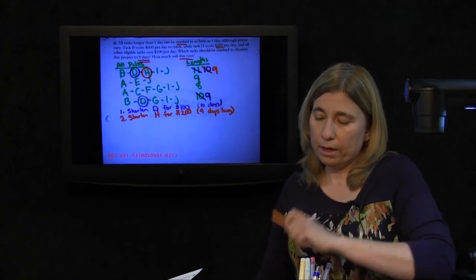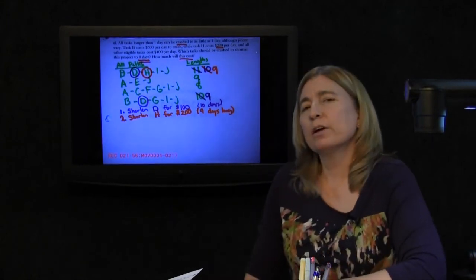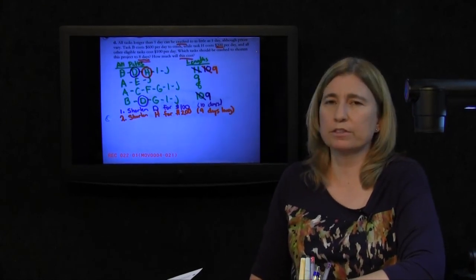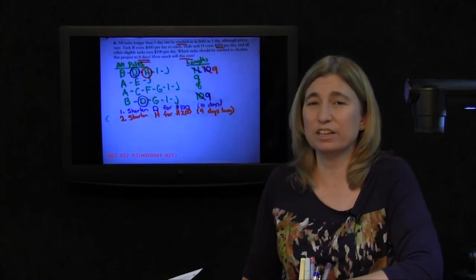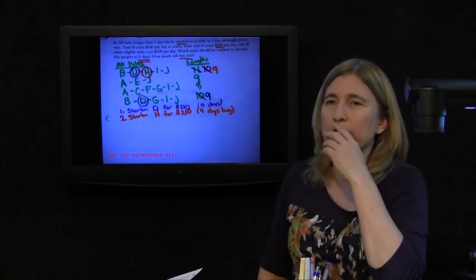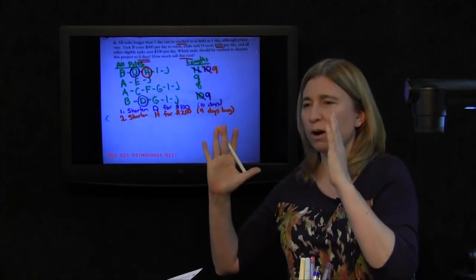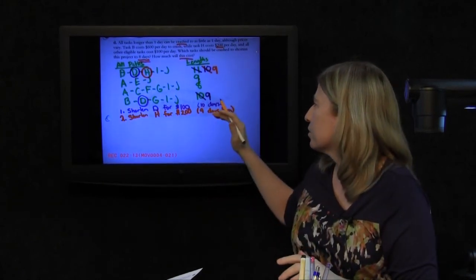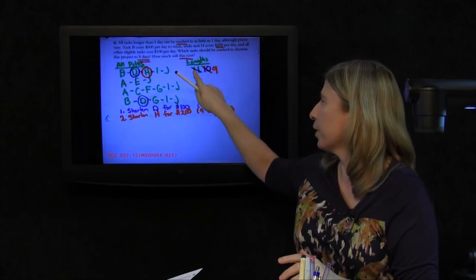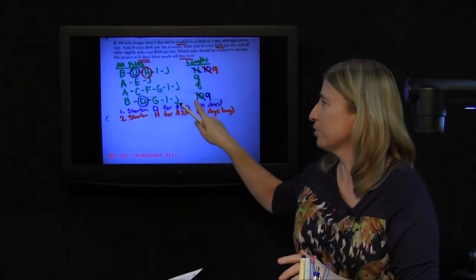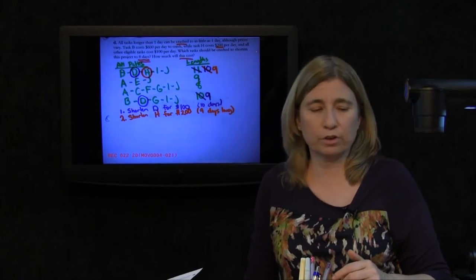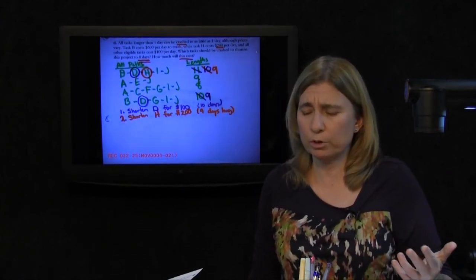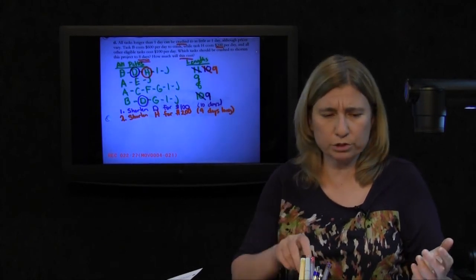Oh boy. Now what? Now we have to figure out the least expensive way to get these paths down to no more than 8 days long. And this is what tends to happen in crashing. As you squeeze the project, the paths start to pile up, so to speak. I need a solution that will shorten this path and that one and this one. 3 out of the 4 paths. Well, I can shorten more than one activity, but the question is which ones do I want to shorten?